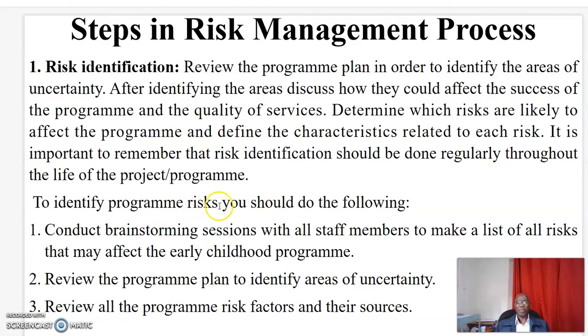To identify program risk, you should do the following things. One, conduct brainstorming sessions with all staff members to make a list of all risks that may affect the early childhood program. Two, review the program plan to identify areas of uncertainty. And finally, review all the program risk factors and their sources.